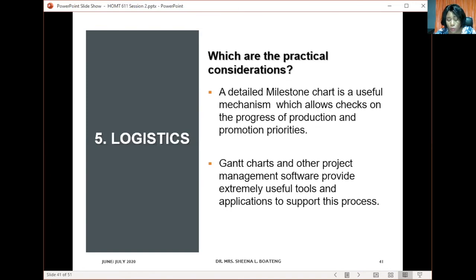And it helps you to plan the timeline leading up to your event, and then give yourself key milestones that will help you to see whether or not you are on course towards performing all the activities that you need to perform in order to successfully host the event on the D-Day. Some people too will go into more detail and add a Gantt chart to the milestone chart.